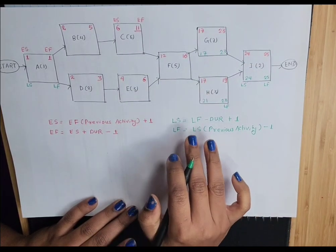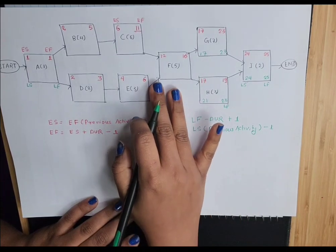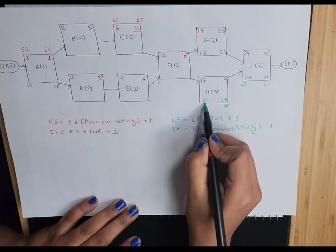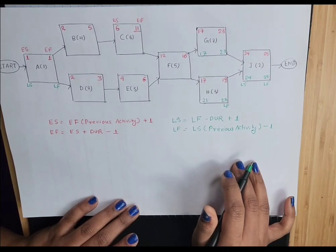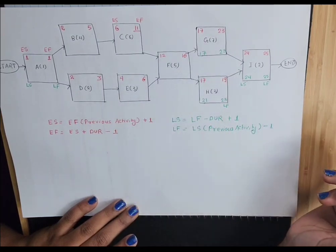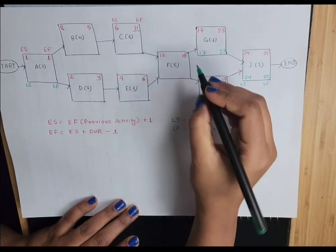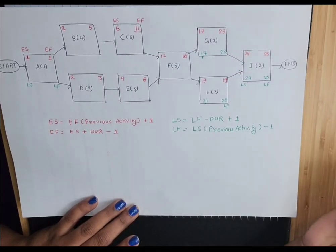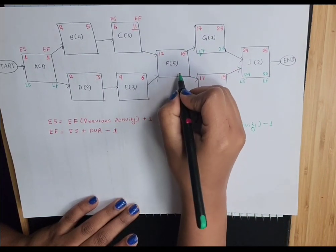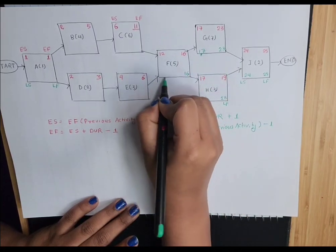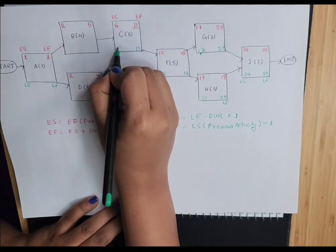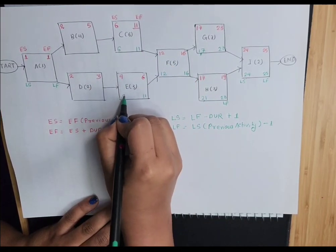Here you have to be very careful again when calculating late start and late finish for activity F. As you can see, there are two late start values: 21 and 17. While moving backward, you always take the smallest number. Here 17 is the smallest, so we take 17. So the late finish for F will be 16 and late start will be 12.